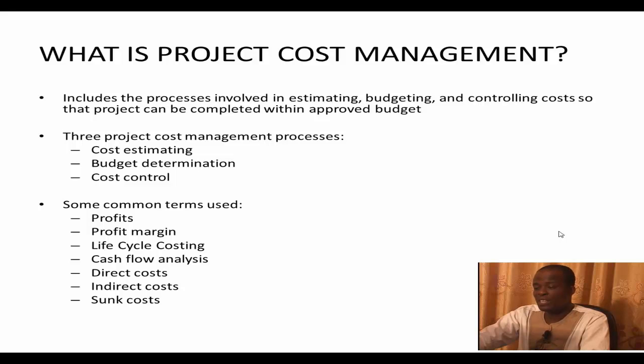Then we have cash flow analysis, very, very important again as a project manager, because you must know at any point in time how much money is coming in and how much money is going out, so that ultimately at the end of the project you have more cash coming in than going out. If not, in the worst case it should be zero, but I don't suppose anybody wants to do a project where at the end the cumulative cash flow is zero. So cash flow basically talks about cash coming in as cash inflows and cash going out as cash outflows, and along the time axis how these pan out.